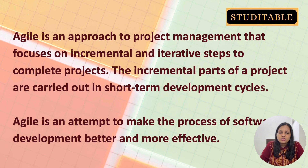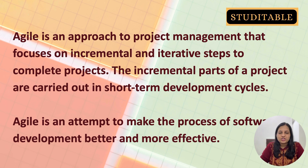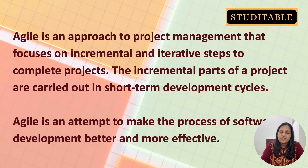Agile came as a rescue where the whole project is not created at once. Instead, the project is broken down into smaller cycles or smaller parts, each developed independently — similar to a microservices approach. For example, if you have to create a shopping application, instead of building the whole application at once, Agile breaks it into smaller parts: a home section, a payment section, a cart section, and a services section. Each of these sections is developed and given its own iteration separately.